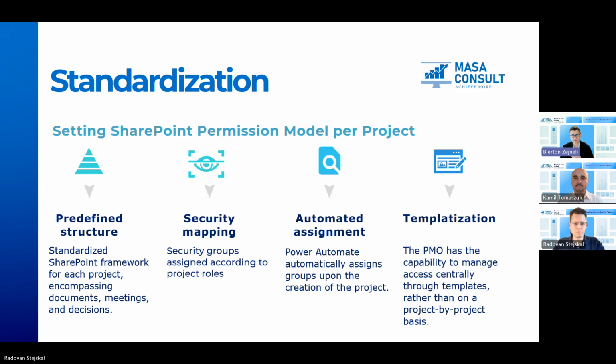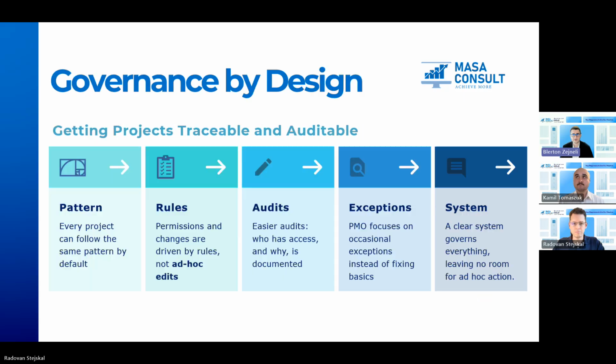So if the PMO at a certain time decides to change the standard access model, the change is always possible to be made also on the template and rolled out to multiple projects instead of doing it separately by project. So this approach basically provides a good foundation for governance by design. And every new project that goes through the intake and the blueprint that we use uses the same pattern by default. The way the workspace looks, the way SharePoint is structured, the way access is assigned, it all follows predefined rules.